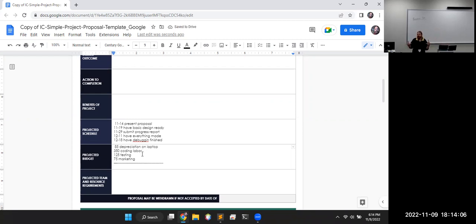At that point that I was expressing there, the only way we get good at those two things is to practice it. So if you practice it on everything, and then at the end, come back and make the adjustments to your schedule and the adjustments to the budget, and then apply that, how far off you were, to your next guess at a schedule and a budget. When you're out there in the real world, you'll be really good at predicting those two things, and people will take notice of that,